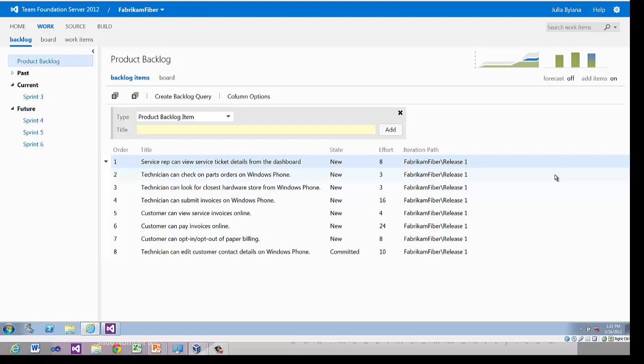Well, you have the burn down chart. Yeah. It tells you that it started with this. But even so, the backlog will be adjusted. So the burn down chart will be adjusted if, let's say you have a task that you estimated takes 3 hours, and then you change it to 5. The backlog will be adjusted.